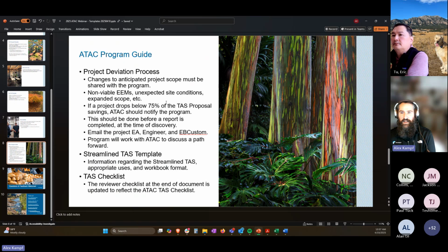These can be overcome, but we do want to know if you thought the site had trending and the customer told you, oh yeah, our BAS system is solid and we can pull trends for you. And you get there and they're like, yeah, we record 24 hours of trend data and then delete it. That would be an unexpected site condition. So please let us know if you're running into things that are going to impact the scope of work, for positive or negative. Expanded scope is great.